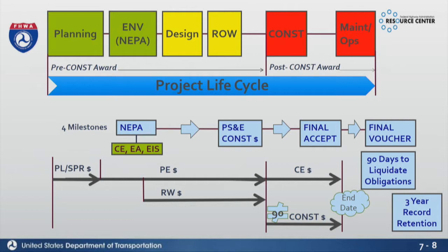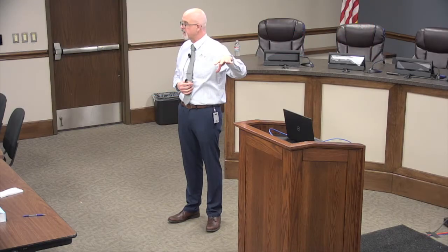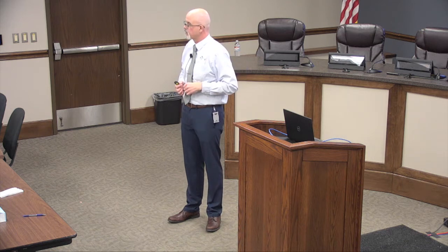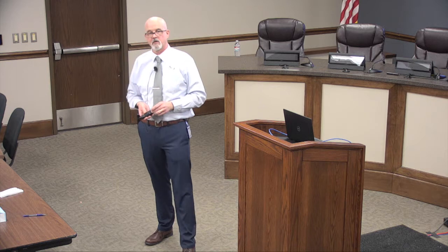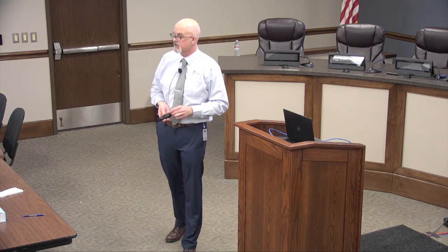Now, right-of-way, we have what's called the 20-year right-of-way rule. So let's say you get done with design and now you're in right-of-way, and right-of-way's been out there for 20 years and you've never moved to construction. You have to justify why, and you may have to pay back your right-of-way costs. You don't have to pay back the PE because you did move to the next phase, but you would have to pay back right-of-way after that 20 years. We don't see that happen too much. We see more often the PE 10-year stuff versus the right-of-way 20-year.